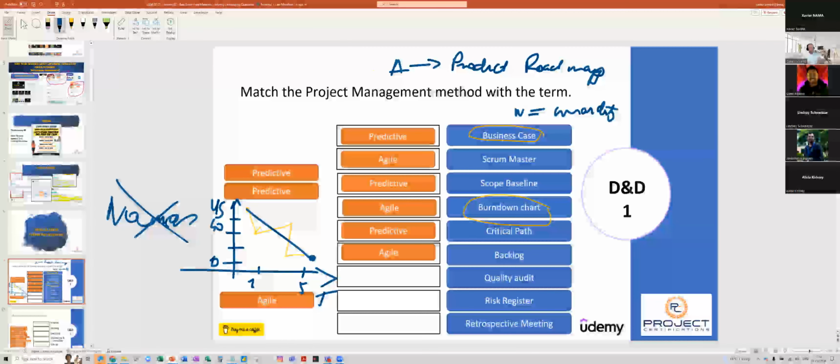And the key reason why we're having this easy to read chart, and on Agile we're not overcomplicating it, is because on Agile, we never send status reports out. We never ever send status reports. Instead, we're telling the people, go to, I don't know, second floor, fourth corridor. This is where we have the information radiators. If you want an update on how things are going, you go there and have a look. We're not sending status reports because, as per PMI, status reports are only linked to waterfall, and having status reports would completely go against the Agile values.